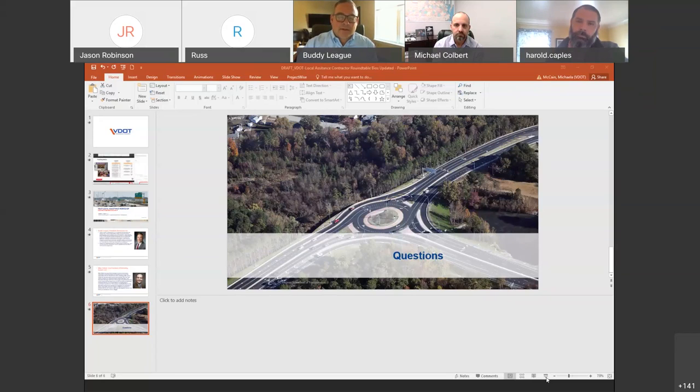If there are time constraints, and we feel like we can't get a job done within the time frame specified, we address that in our bid as well. And I can say that for the localities that have a robust bidding system with a system of taking questions and answering those questions, those questions are key to an inside look at where the contractor is seeing the most amount of risk on a project.